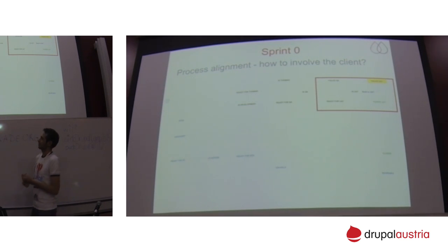So this is an extension of the description, and it's an acceptance criteria that is really important for the Scrum project, because this is the guidance that the QA guys and all the team are going to follow in order to deliver the specific user story. Then, once the acceptance criteria is provided, it is marked as ready for development. And here is the phase where the Scrum Master or someone from the team is checking the acceptance criteria and reading the user story. For this specific project, it was mainly me, because the team was really busy with very many tickets, and we really were running out of time. So I was checking the acceptance criteria, and if it is not good enough, then it is returned back, so the client should elaborate more and provide an acceptance criteria that is reliable and meaningful.